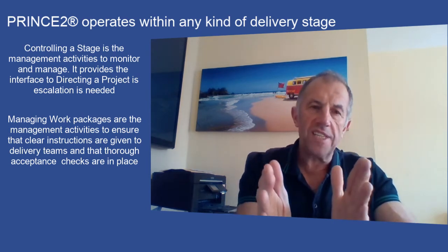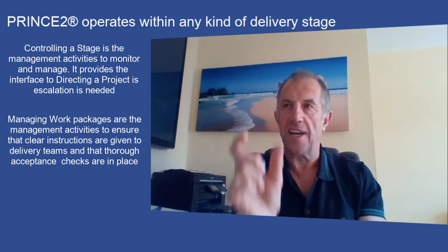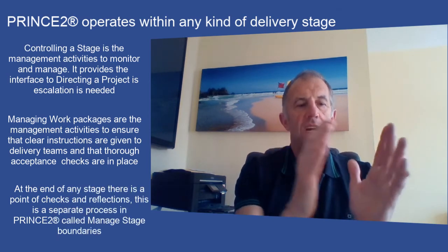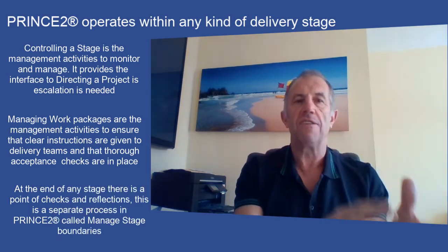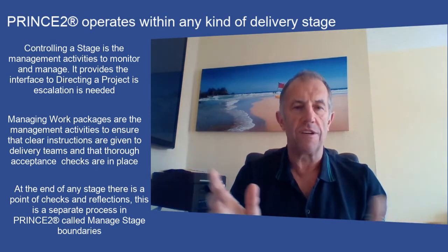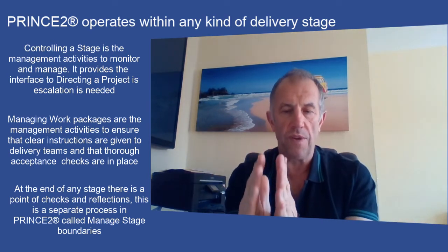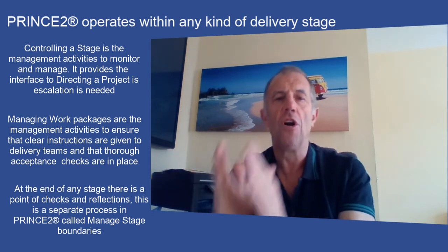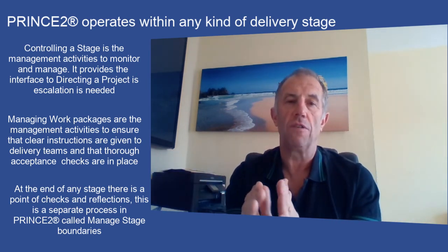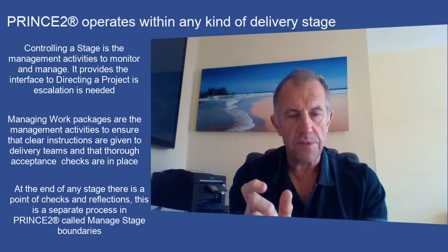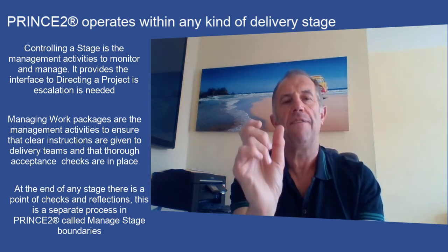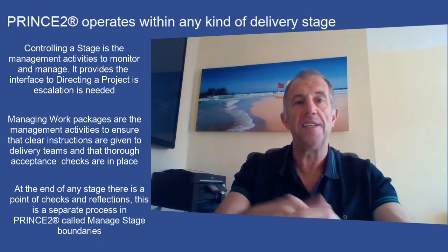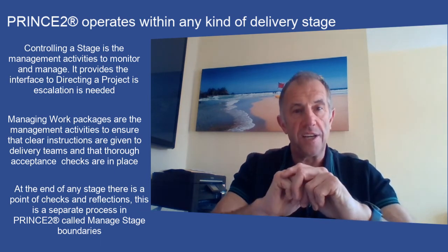And then whatever your stage is, you come to the end of a stage, and it has a thing called managing a stage boundary. So whatever stage you were in, design, build, develop, whatever words you're going to use, you should come to a point where we need to make a decision if we're going to continue or get our progress signed off. And so there's a bunch of simple steps that happen at the end of every stage, whatever stage it happens to be, and that's encapsulated into managing a stage boundary.